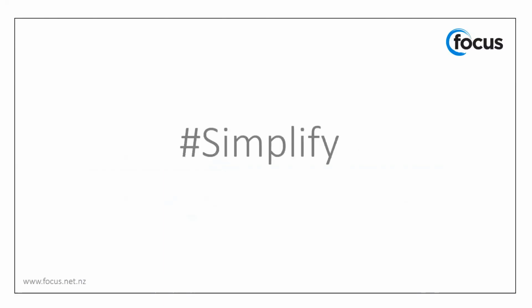Okay, and what does keeping things relatively simple actually look like? Well, one approach is to identify what you're currently doing in your day-to-day processes. And when you install your new ERP software, you try and keep things as close as possible to what you're used to. Then once you're up and running and have got used to the system, this could be in 4 to 6 months' time, you can then re-engage with your partner to build out some of the other functionality.